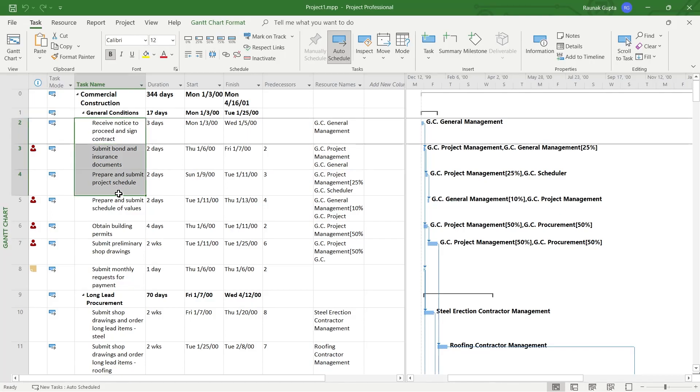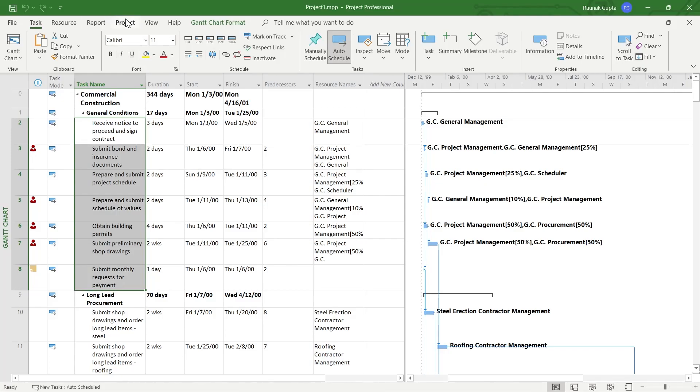So I'm selecting these tasks and if you want to set the baseline to whole tasks, what you're going to do is leave the chart as it is and then simply head over to the project option. So the first step is heading over to the project tab, click on project at the top